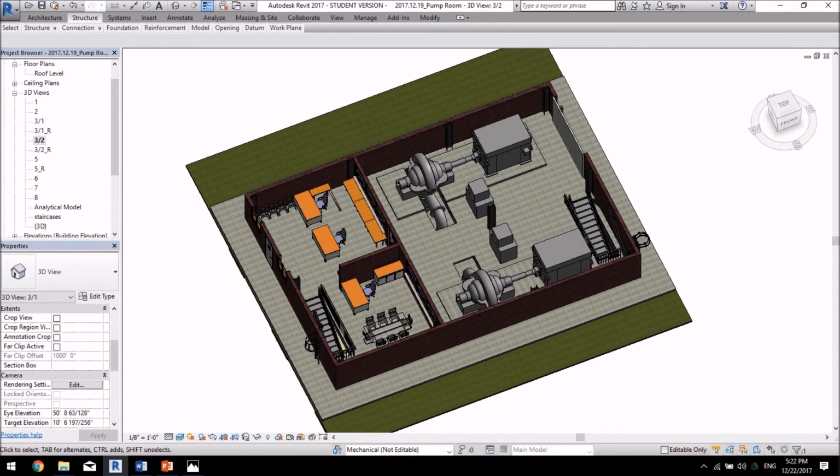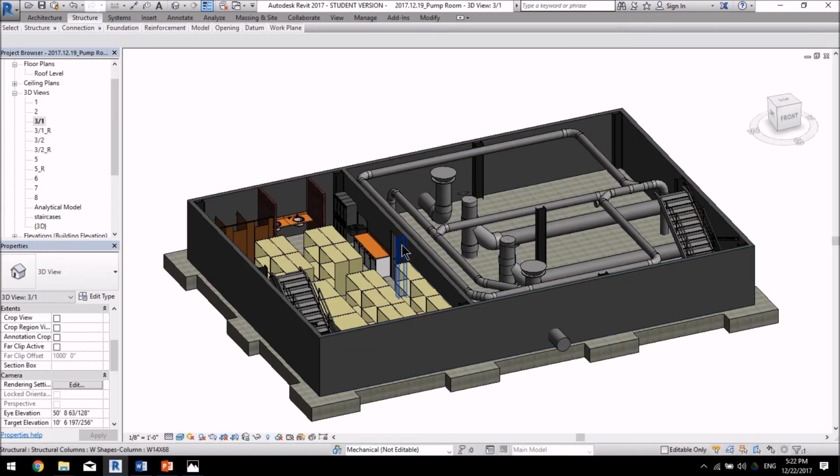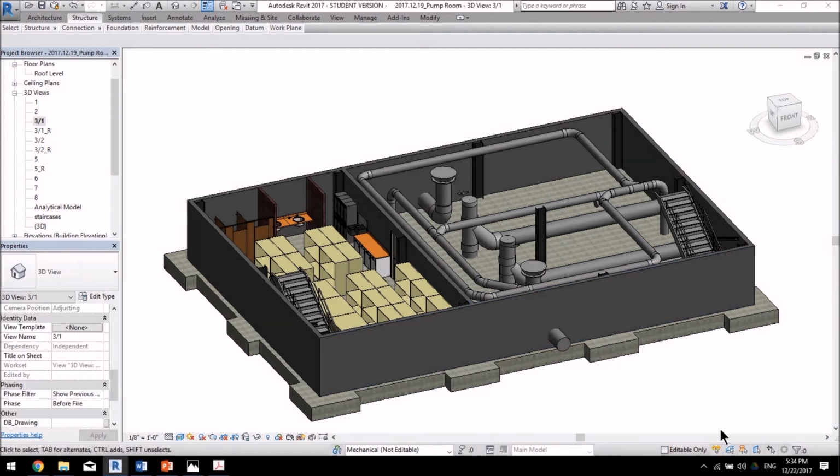Eventually, in spite of all the drawbacks in the firefighting process, the fire was extinguished in 70 minutes, and by exposure to the fire for this duration, these two steel columns in the storage room, this one and this one, were buckled, unfortunately. The FP Insurance Group claims that the Texas Builders Construction is also liable for all the damages outside the storage room, in addition to the inside, because they are the reason for the buckling of these two columns.